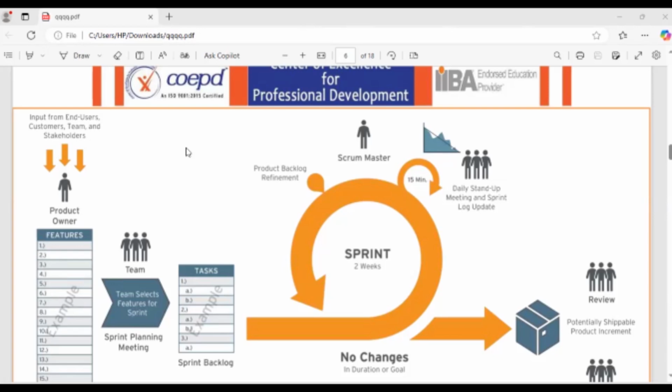1 hour they may consider as 7 to 8 hours, depending on the organization. The user stories are added to the product backlog and prioritized. In this 100, first we are going to take 10 user stories for a sprint. They will try to add those identified user stories to the sprint backlog with the help of these prioritization techniques or MVP, and they will discuss everything in the meeting called sprint planning meeting.